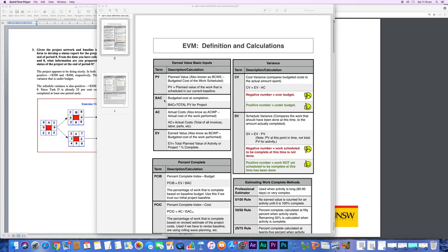That's again a number or budget or value that we have developed in our planning phase. So that's the budget that we estimated. Remember, we get the information on the cost of every activity. Summing up the cost of every activity, we get a cost of work packages.